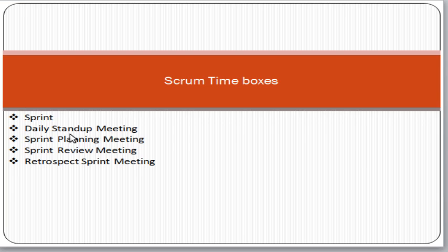In this 15 minutes meeting, all the core level things are discussed among the team members on a daily basis. Remember, friends, that there should be a limit of 15 minutes. This daily stand-up meeting should not be more than 15 minutes. Normally we do this meeting at the start of the day, like at 9 o'clock or 10 o'clock, or we can do this meeting at the end of the day as well, but the start of the day is the more preferable time.